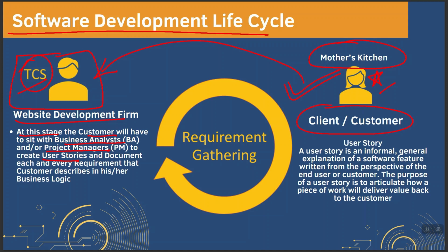Now, an epic will have many user stories, which are basically the granular form of the complete feature identified as the epic. These small granular user stories are then given to the developers to develop, then to the testers to test, then to the client to play with it, and then finally the complete feature is launched with the application. So basically, user stories are the granular form of the complete feature.